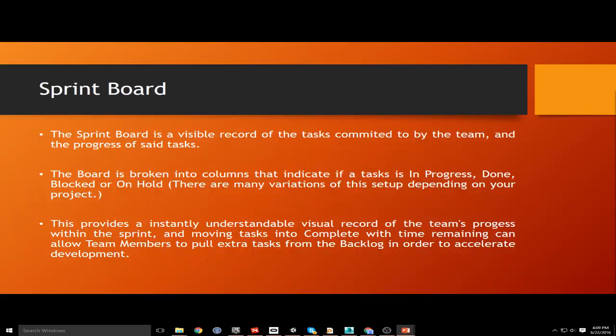So that's a blocked task. One that's on hold would be one where you're kicking along and working on things, and then all of a sudden the requirements change. Let's say you're working for a client and they say, we wanted everything to be totally dynamic and internet web enabled. And then they send an email going, we've had a change in management and now we don't want anything to be online or internet enabled, or we don't want any Googles in our thing.